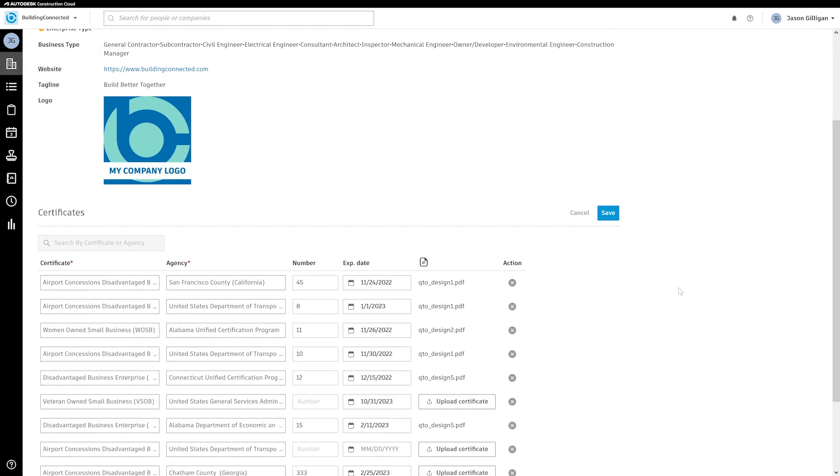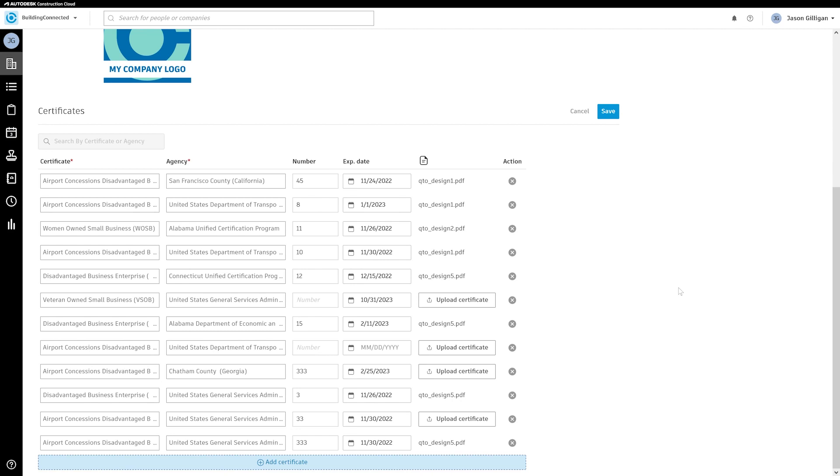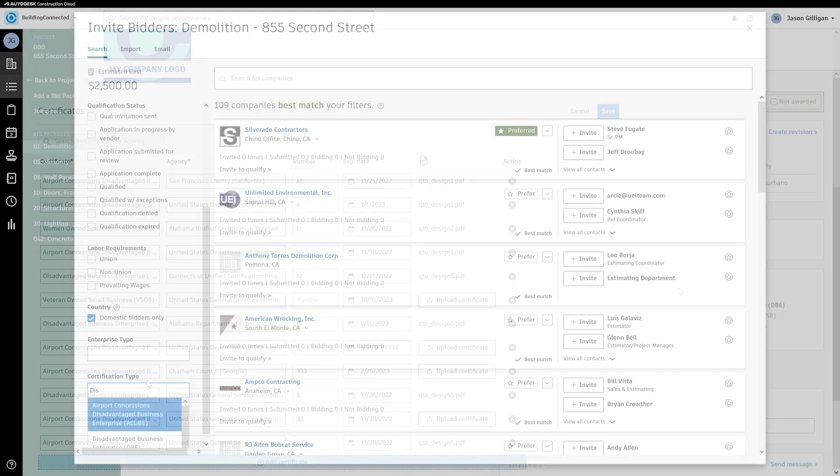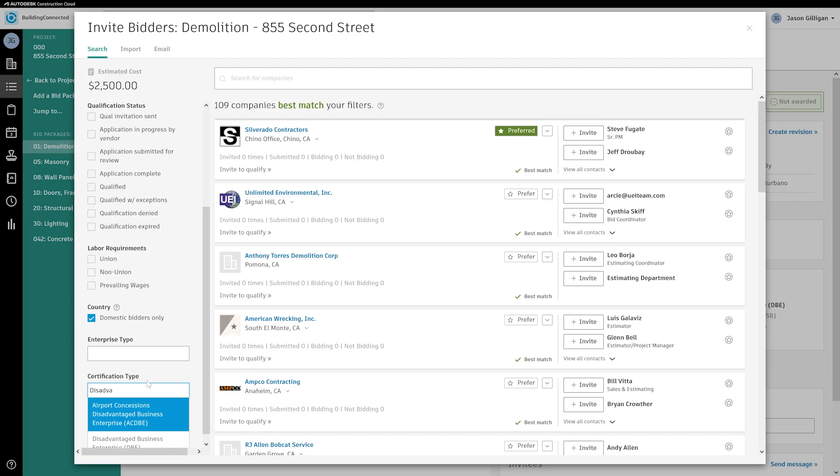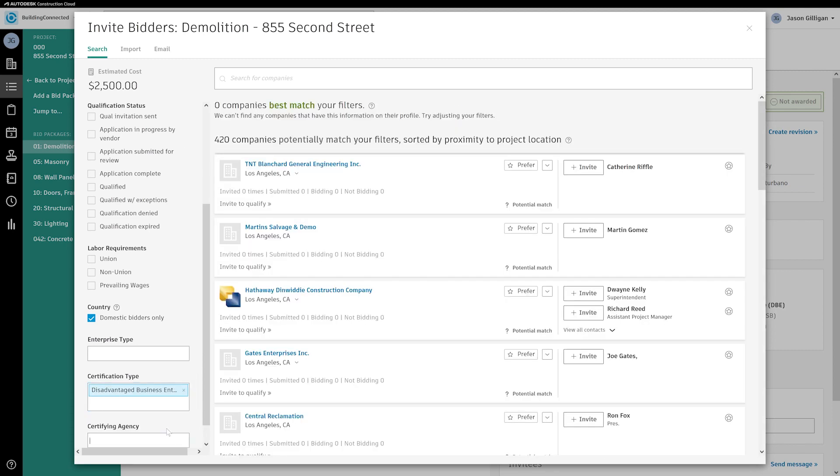With this update, subcontractors can add their business enterprise certifications to their profile so that GCs can reliably search for, identify, and track diverse trade partners during the bidding process.